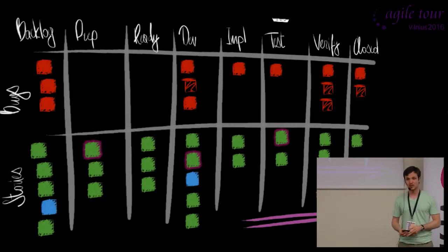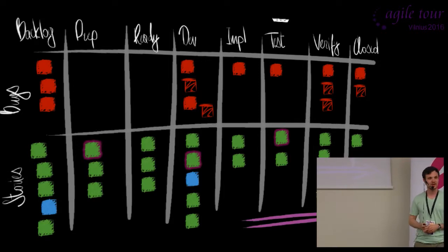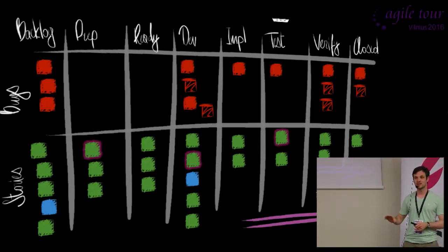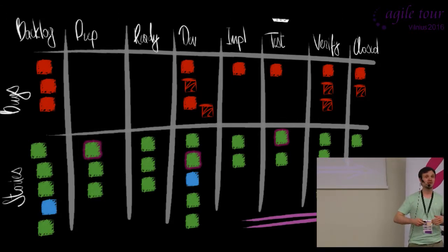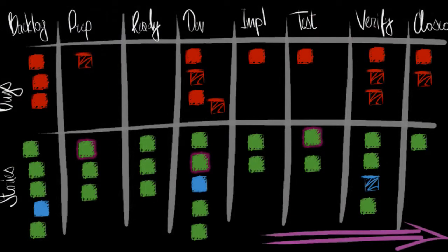And this way, it promotes that the team actually puts effort into fixing it, and fixing it fast. Now, we also want to visualize that there is some work happening in development. And for that, we have sub-bugs. Here, we create a sub-bug and put it in development. And this way we know that some additional work popped up out of nowhere, and now it eats some of our development time. And say, if there is a missing requirement, we may create another sub-bug and put it in the preparation column. And this way we highlight that there was some information we could have discovered beforehand, but we didn't. And until those two are fixed, we cannot move this item.